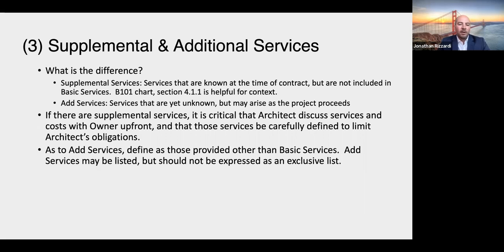I think it's much better, you can list them, but don't express it as an exclusive list, and leave a provision at the end for any other services that may be provided that are not included in basic services, to give yourself some room there.